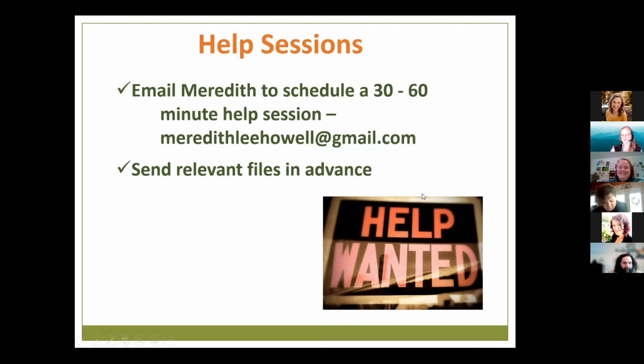Yeah, absolutely. In fact, it was always my practice that if I was writing a grant to a particular foundation for the first time, I would make that project small, really achievable, with really clearly defined outcomes and a really clearly defined start and finish, so that when we got it and completed it, they'd be super happy, and then they would more likely fund the next one, which would be bigger. And that was always my experience.